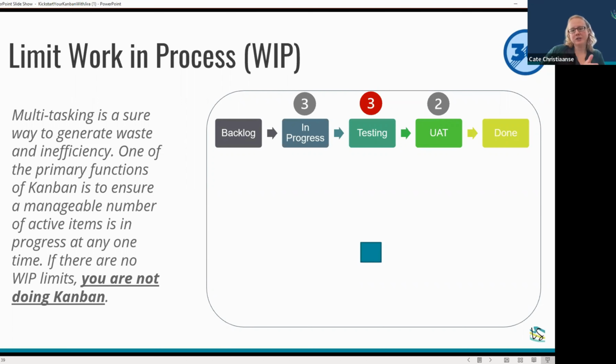In Jira, on that same view we showed a few slides ago, you can edit the WIP limit that you use for each of these columns. What you're doing is saying this is the maximum number of items that can be in each one of these states. You start by experimenting. As a team, you can agree on what starting numbers you want. On the slide, I put 3, 2, and 3. Because you're an optimist. Yes.